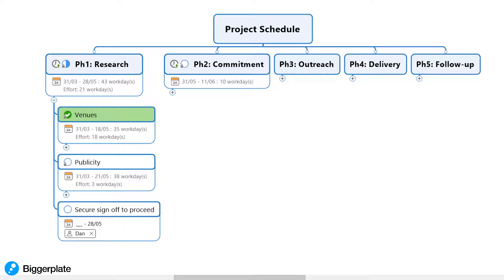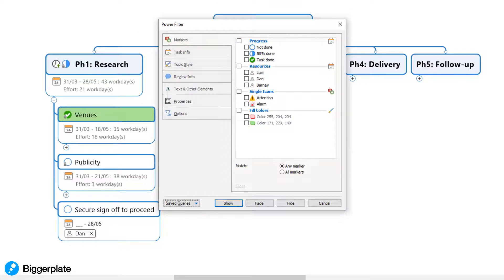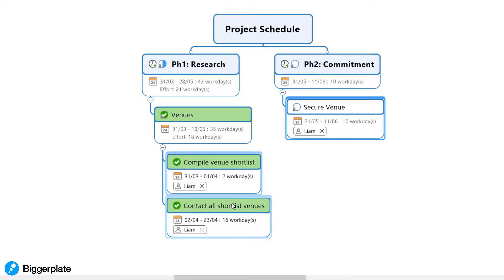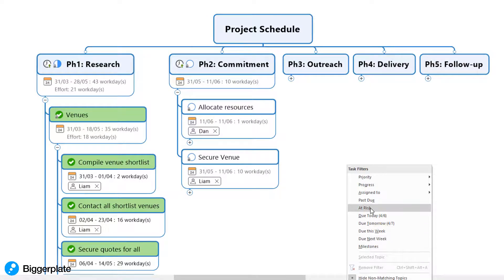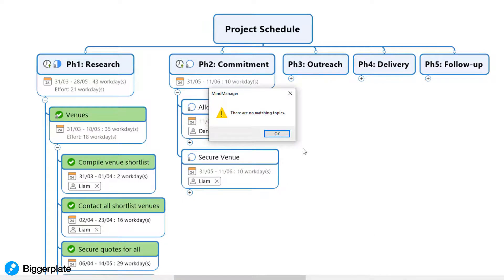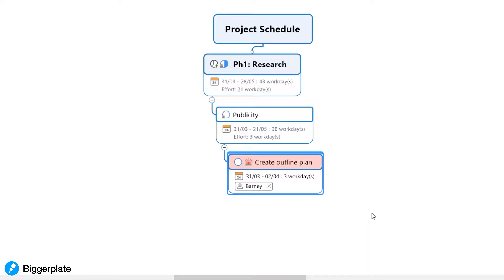Having used the icons and the task information functionality within MindManager as we built out our map, we can now also use the powerful filtering functions to reduce information on the page to show specific items at specific points in time. For example, we might want to see just the tasks that have been assigned to a specific team member, like so. Alternatively, you could use the filter to quickly focus in on items that are perhaps due this week, or maybe items that are behind schedule, or perhaps marked for attention for some other reason.